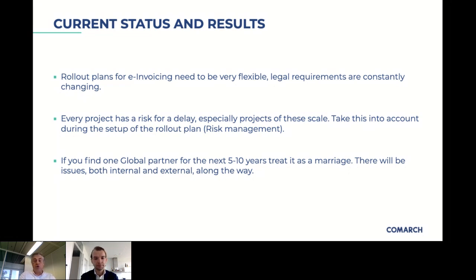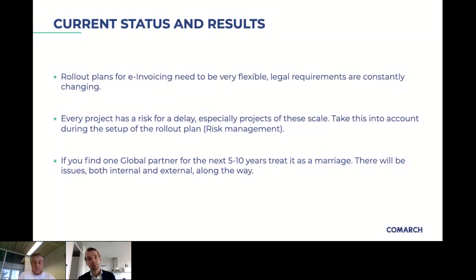Are we there already? Definitely not. Do we still have a lot to do? Yes. Are we still working together to reach the end state? Also yes. I agree on the point about flexibility — Brazil, Taiwan, and three months ago India was mandating e-invoicing for April 1st before they moved it due to COVID. A roll-up plan for e-invoicing needs to be very flexible, as legal requirements are changing at a constant rate.